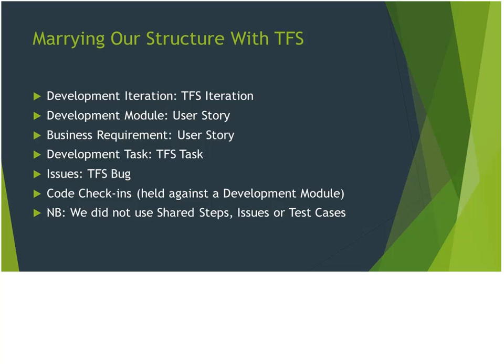So what that meant was I could go to a specific development module record in TFS, and I could see all the bugs in the one spot, I could see the tasks, see how they're progressing, I could see all the code check-ins in the one spot, and it was very easy for me to see exactly what was happening in regards to that specific development module.